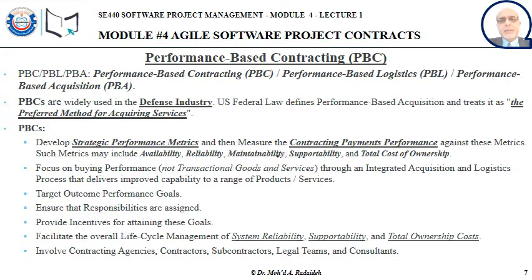Well, in addition to the cost of executing the project, which is paid to the service provider, the customer also carries some initial costs during the preparation period, the initiation and planning, when they issued or prepared the RFP, the request for proposal. The customer staff who worked on preparing the RFP, collecting and defining the requirements, etc., and they may have hired a consultant. The cost of all that is considered part of the customer's total cost of ownership.